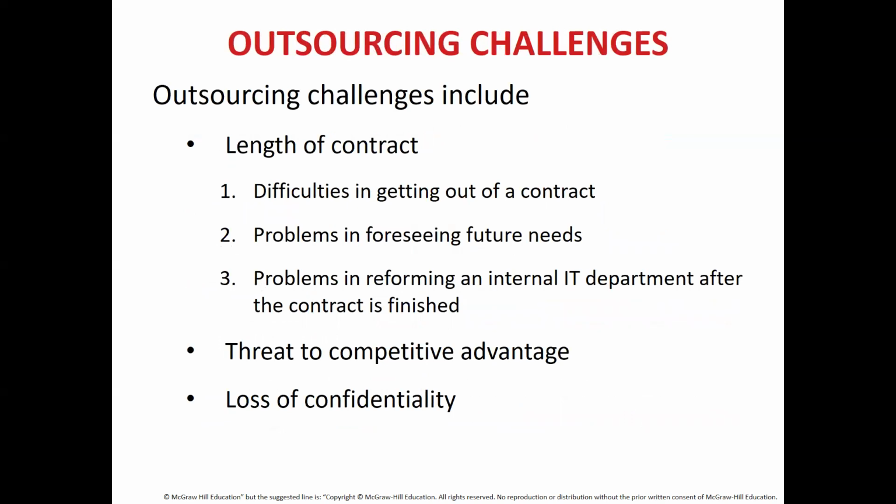Outsourcing challenges. Now, with every good thing comes the baddies. Okay, and over here we also have some challenges: the length of the contract, difficulties in getting out of a contract, problems in foreseeing future needs, problems in reforming an internal IT department after the contract is finished. Now, I mentioned a term called SLA, service level agreement.